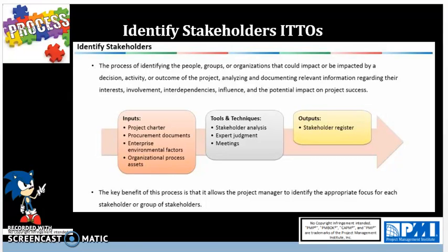Other inputs include your OPAs, organizational process assets, and these include stakeholder register templates, lessons learned from previous projects or phases, and stakeholder registers from previous projects which could be recycled in this process.